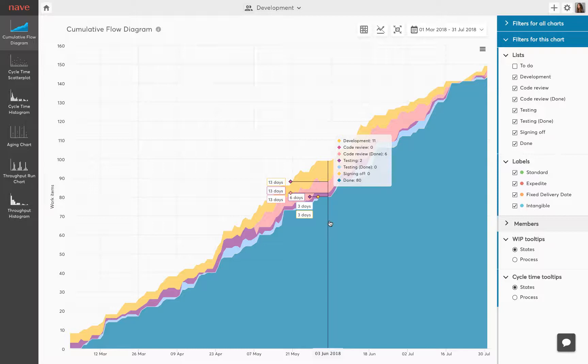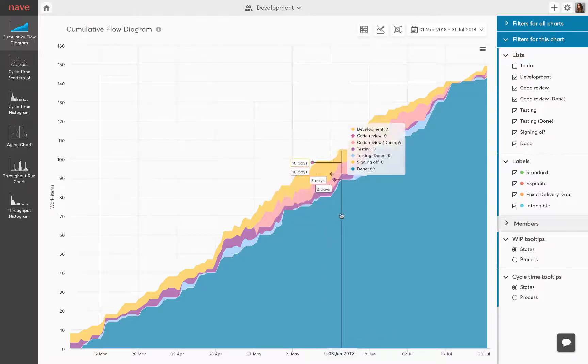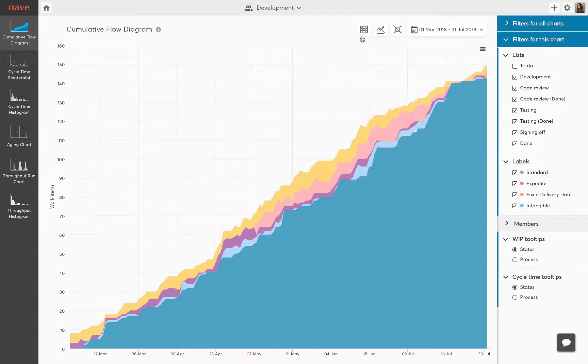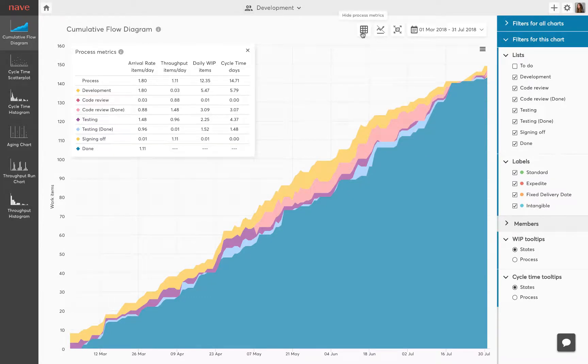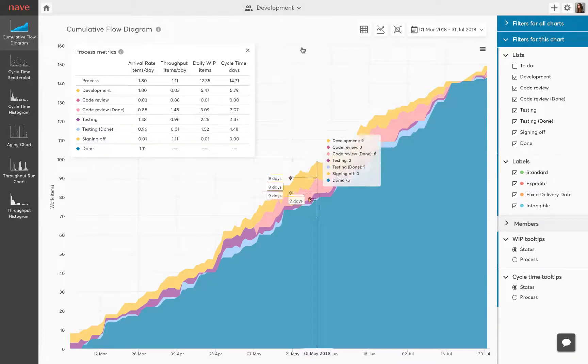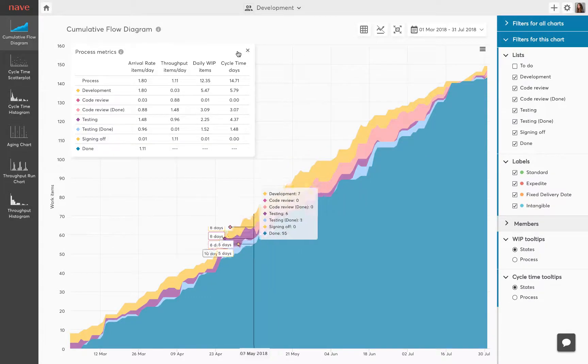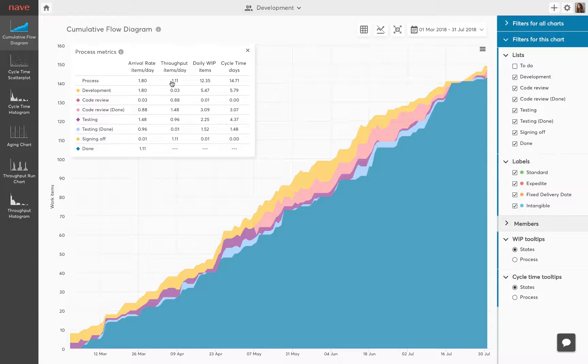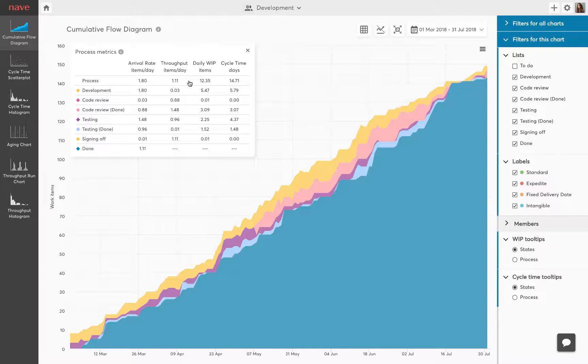The cumulative flow diagram enables you to evaluate the efficiency of your workflow and help you identify problem areas in order to achieve a stable and healthy process. In a stable system the average arrival rate is roughly equal to the average throughput. This means that the tasks arrive in the process at the same speed as they leave it and you have managed to balance demand versus throughput.